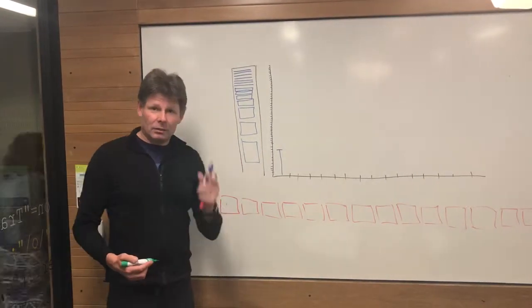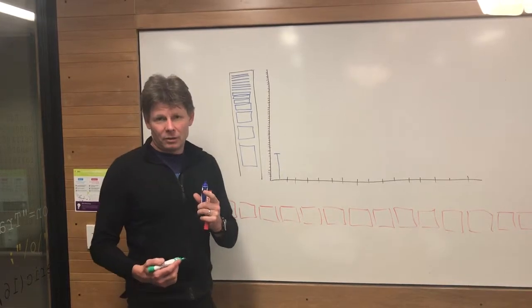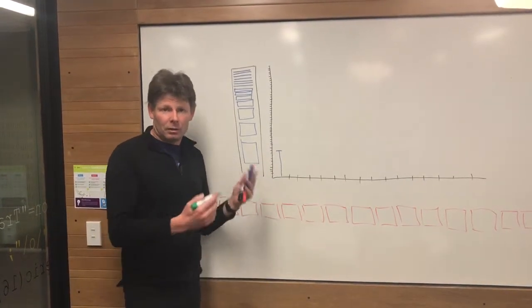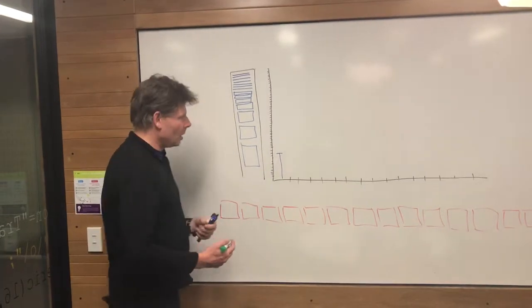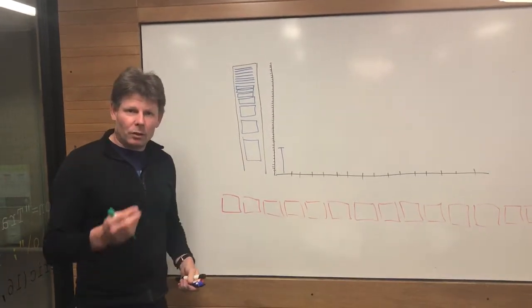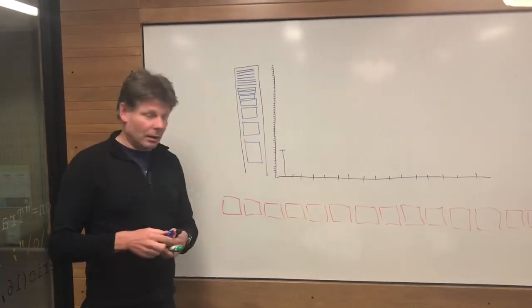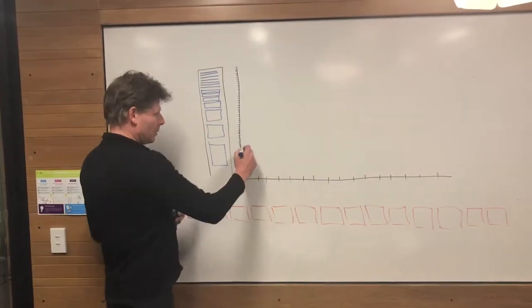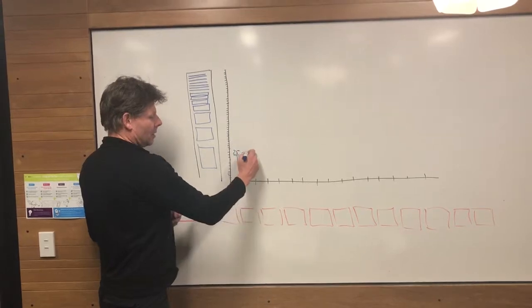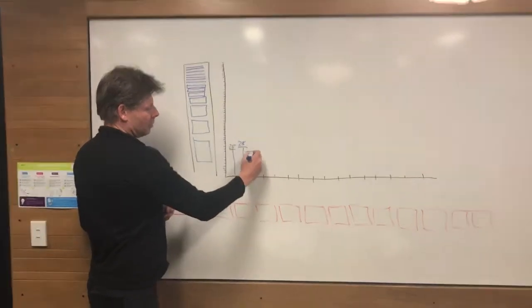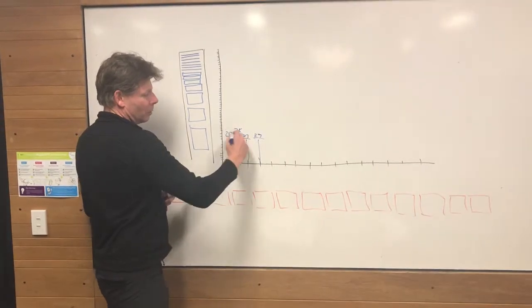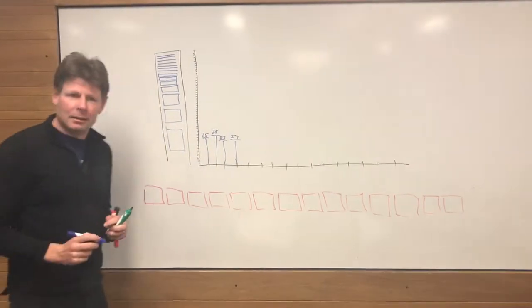This case study is a real story that I was involved in at a bank a few years ago, and it's a good example of how we can use product burn down charts. So imagine, if you will, we've got a team of people that have been working for 4 or 5 sprints. The velocity of the first sprint was about 25, the next one 28, I think 23, numbers something like that, 27. And so we're starting to find that there was a trend.